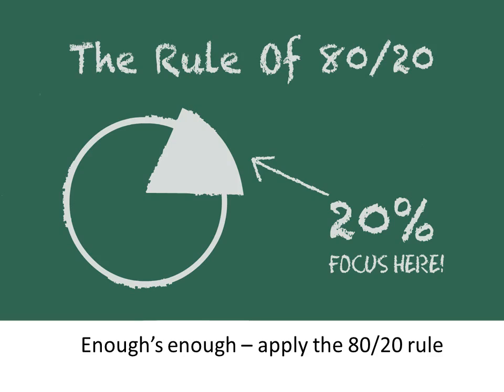So average users would have been able to start using Word and probably never feel the requirement for the other parts. That doesn't mean that we are not going to do the rest, but the 20% first approach is where you deliver the maximum value to the user quickly and upfront, and then continue on with the others as needed.